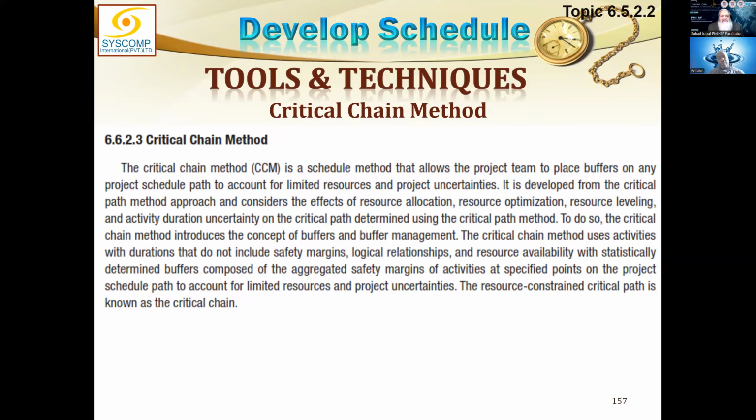This only applies independently to critical resources. Critical resource is not a term related to critical path. These are those resources which could affect delay in the project. They could happen anywhere.